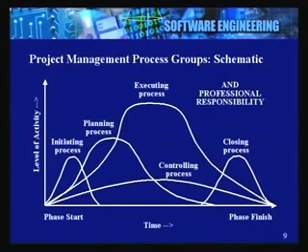You must realize one thing, planning activity doesn't start and stop at the beginning of the project, and some of it may continue throughout the early phases. For instance, when we start developing a project, at the beginning we may not even know what kind of programs are going to be developed, which programs and how many. So the question of planning to allocate the programming work doesn't arise, and the planning usually works as a rolling window kind of approach. The more information becomes available, the more is the need for planning the immediate next particular thing.